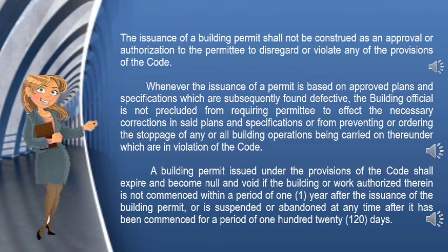So, sinasabi dito na may expiration date ang isang building permit. Once na na-issuehan ka ng building permit, ay meron ka nang 1 year para gamitin ito or mag-proceed sa construction. If within that time ay hindi nagamit ang building permit, it will be considered as expired. Pero may instance like nakapag-proceed na sa building permit within the year, pero nag-stop ito. You will be given an allowance of 120 days para tapusin ulit ang building.